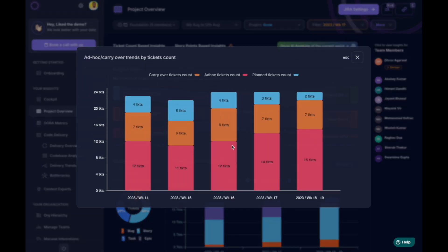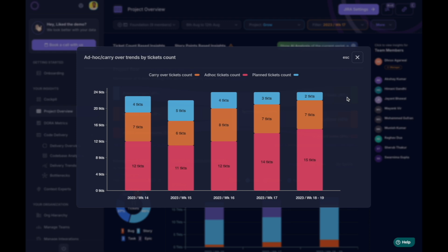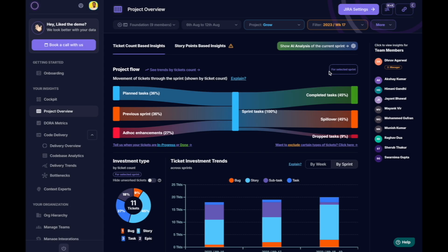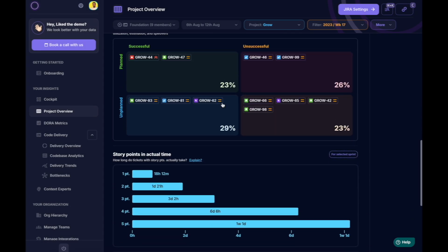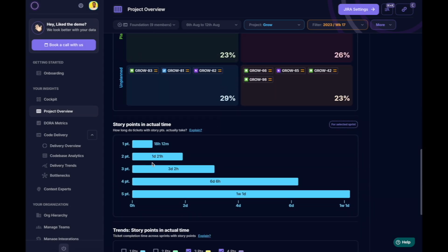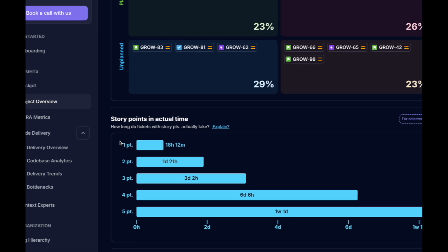Spillage might occur due to two reasons: extra work from ad hoc tasks, which we can track as a trend, or poor estimation adherence by the team. Let's break it down.